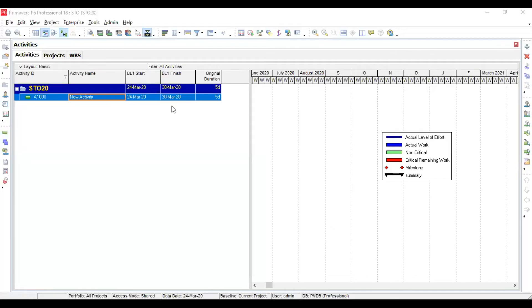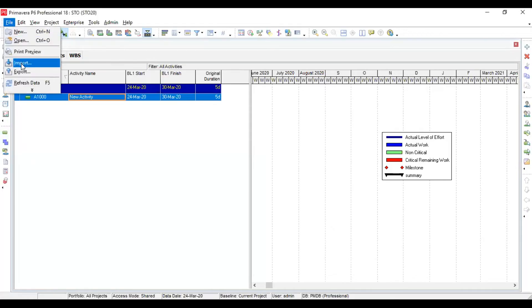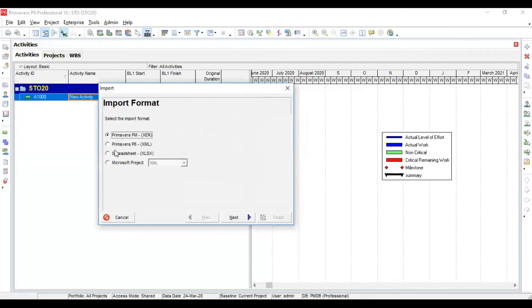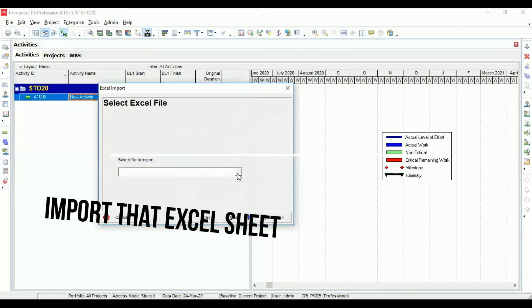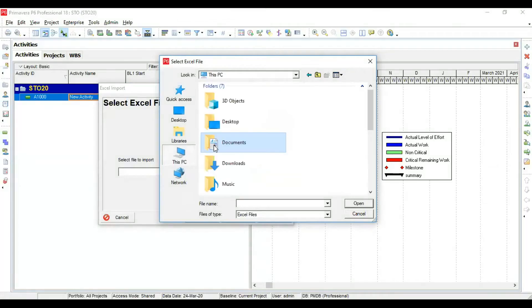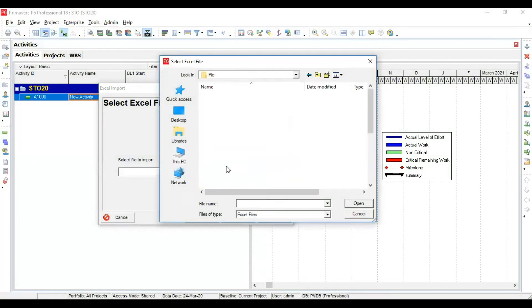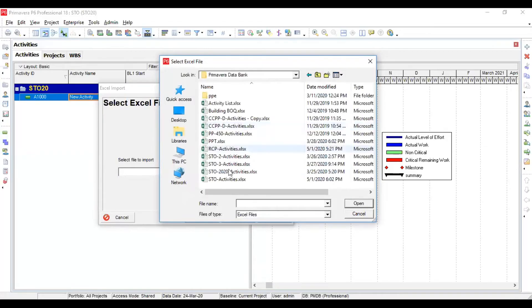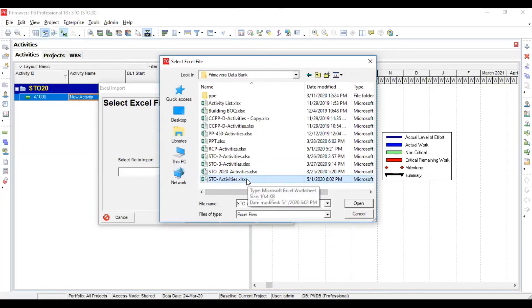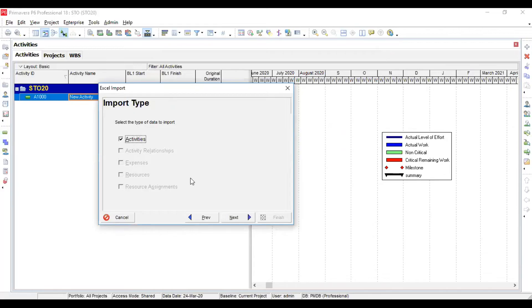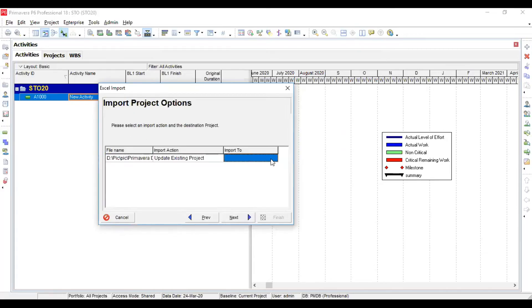Now back in the Primavera 6 dashboard, we execute the next step: importing that Excel sheet. Click on File, then Import. Once you click Import, a window appears. Tell Primavera 6 you need to import a spreadsheet, click Next, then go and select that file from your computer. Navigate to the drive and folder where you saved it — here I have Drive D, Pictures, Primavera data bank — and select the sheet. Click Open, then Next. You are going to import activities.